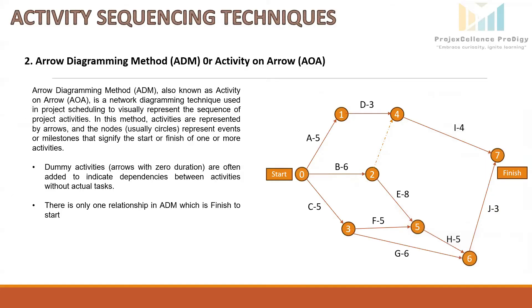Next is the Arrow Diagramming Method, ADM, also called Activity on Arrow, AOA. It is a network diagramming technique used in project scheduling to visually represent the sequence of project activities. Activities are represented by arrows and nodes — the nodes represent events or milestones that signify the start or finish of one or more activities. ADM was historically one of the first methods used for project scheduling, closely associated with CPM, particularly in construction and manufacturing. However, it has been largely replaced by PDM because AOA has many limitations.